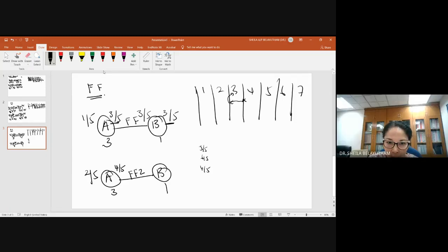Okay, 4 definitely no, because there is a lag here. Unless it is like this: if it's a finish to finish without lag, then yes, it is 4. So 4 is not possible. Let's see. If we place 4 at the finish with 2 days lag, B will finish 2 days after A finishes. So 2 days. It shows the finish of 6 actually.